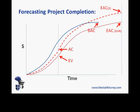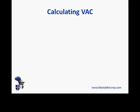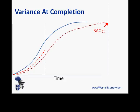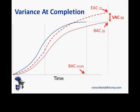So we've just calculated estimates at completion for cost and duration. Something else we need to know is variance at completion, which is budget at completion minus estimate at completion — in other words, the difference between the original estimate and the current forecast cost based on performance to date. If our estimate at completion for dollars is higher than our budget at completion, the variance at completion for dollars is that difference. A positive value is good; a negative value is bad. Similarly, the variance at completion for duration is the difference between the original planned end date and the estimate at completion for duration.